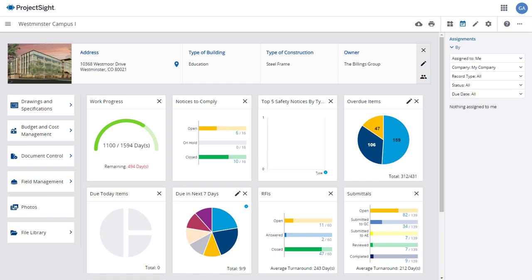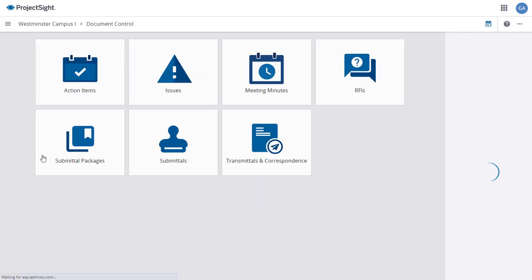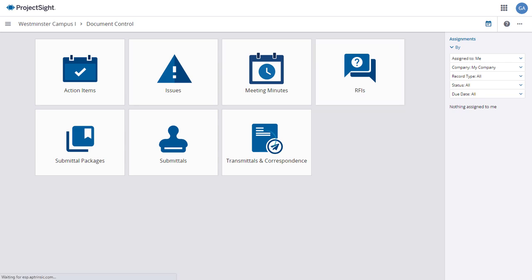The RFI often links to and references other project items such as drawings, specifications, or submittals. To access RFIs from your project dashboard, click on the Document Control tab in the left column and select RFIs from the Document Control options.